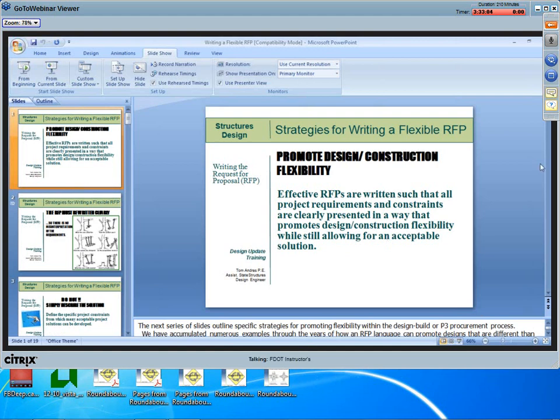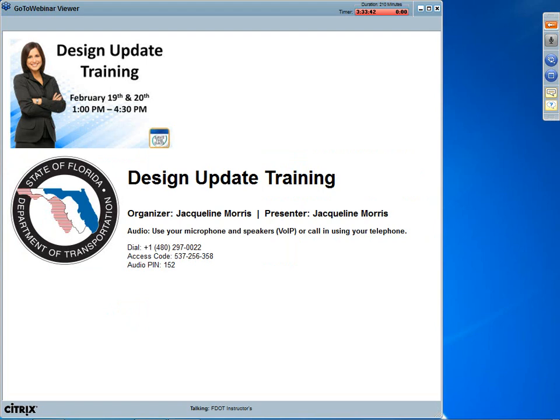That's pretty much all I had. One thing I did want to cover has to do with addressing design build teams' questions during the procurement process. I wanted to point out that before advertisement, there are no problems with answering questions from consultants and contractors, okay? But once the advertisement starts, department folks have to be very careful in how they answer questions. And if the question is simply an interpretation of the policy, that's okay to answer.